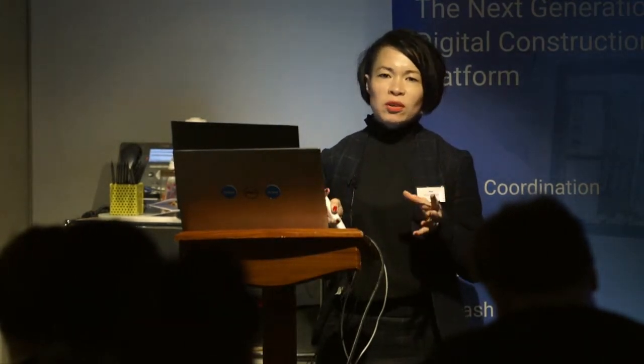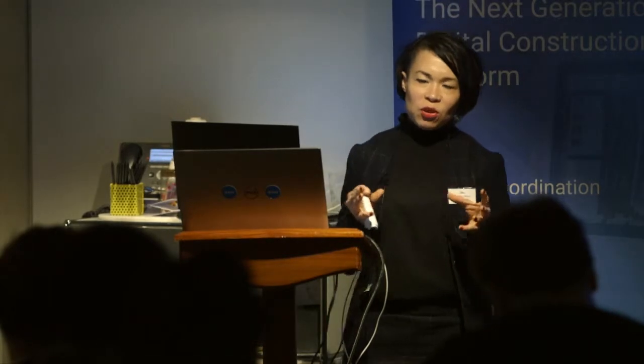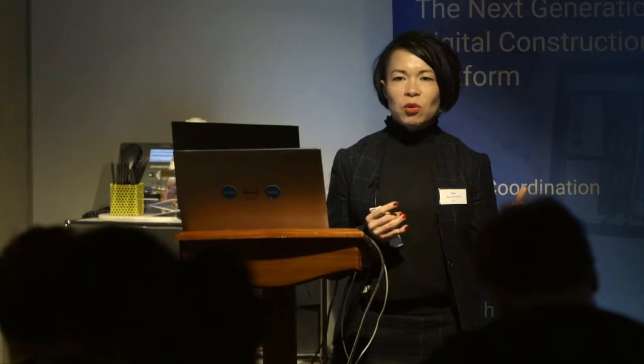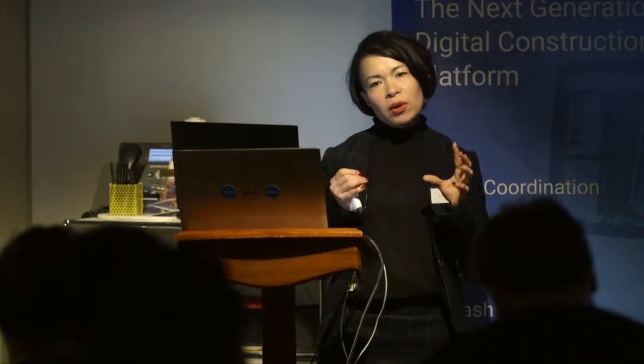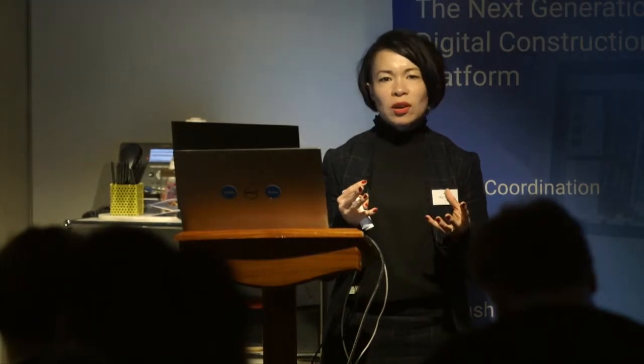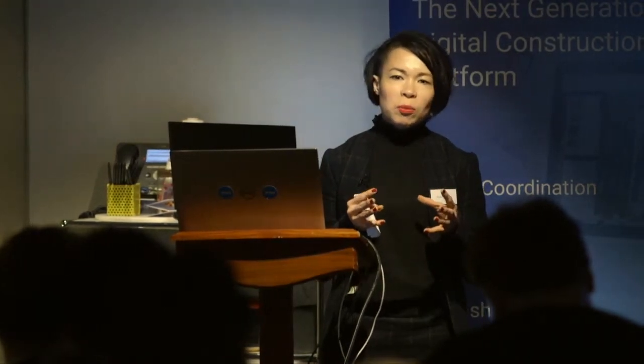It'll always be a contract deliverable, because if it's a contract document, it's like, well, which version of the model is part of your contract? So it's just bearing in mind, when you're thinking about files or electronic data, that's probably not going to be part of your contract documents or the bit at the beginning, but it's what you use to create the process. But again, that's something you may need to explain to your legal advisors, how the model works.